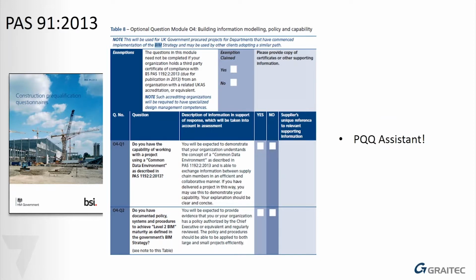The concept behind COBie is the fact that we actually let everybody know about COBie as we go through the project. So I've basically got the Revit stages of work there, the old one and the new, and also the CIC work stages as well. And you can see that we basically let the end person know about what we're doing with the building from the conceptual stage all the way through to the construction stage. So the COBie Drop 4 will be basically an as-built spreadsheet. Yeah, that's the final spreadsheet that gives us that final information.